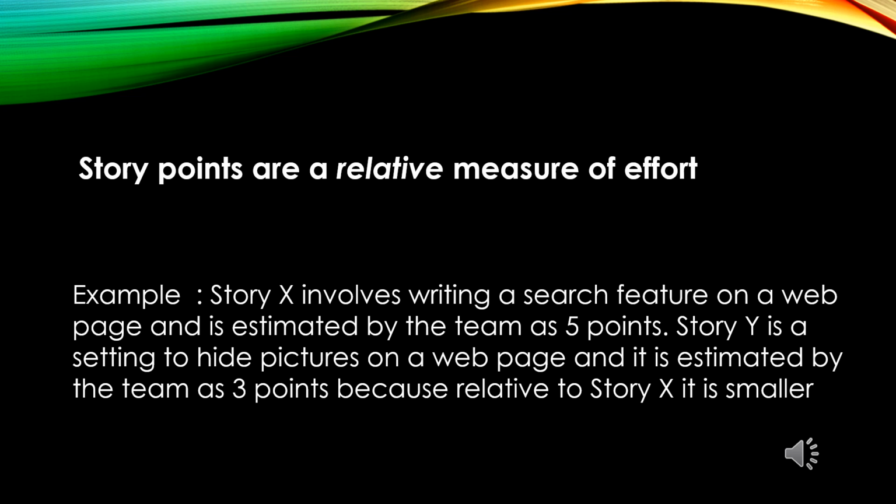A team can decide to reset their baseline for what a story point is. The downside with this is that they will lose some value of their velocity history, as it will no longer be a good guide to what their capacity is for future sprints. But there is nothing to stop a team doing this.